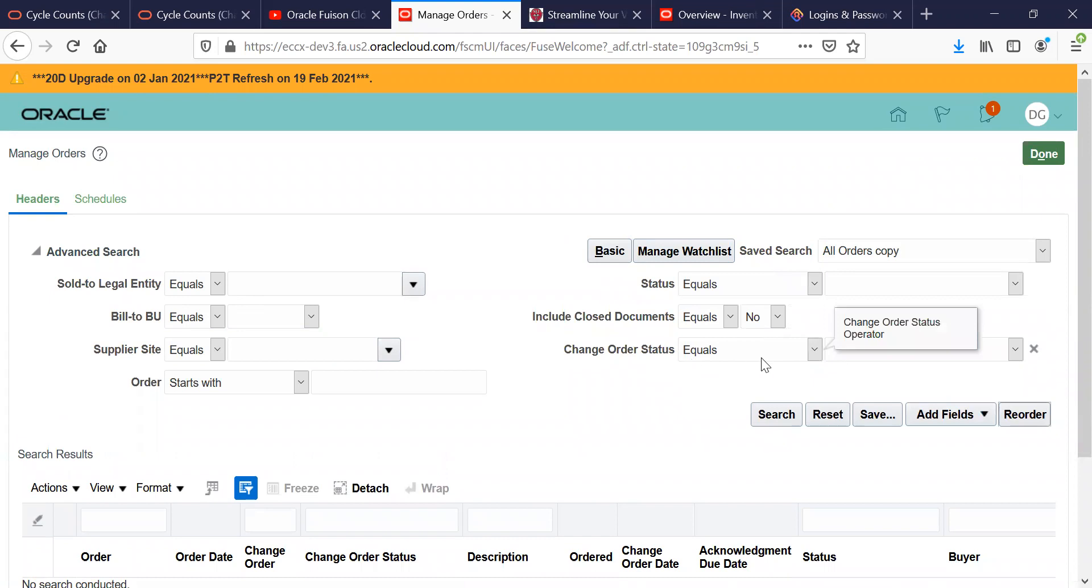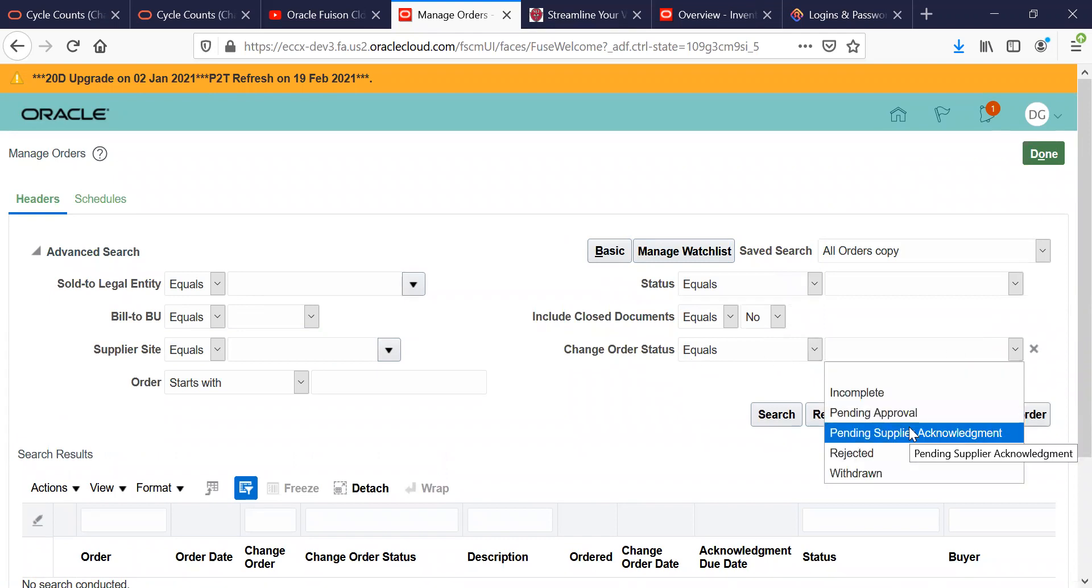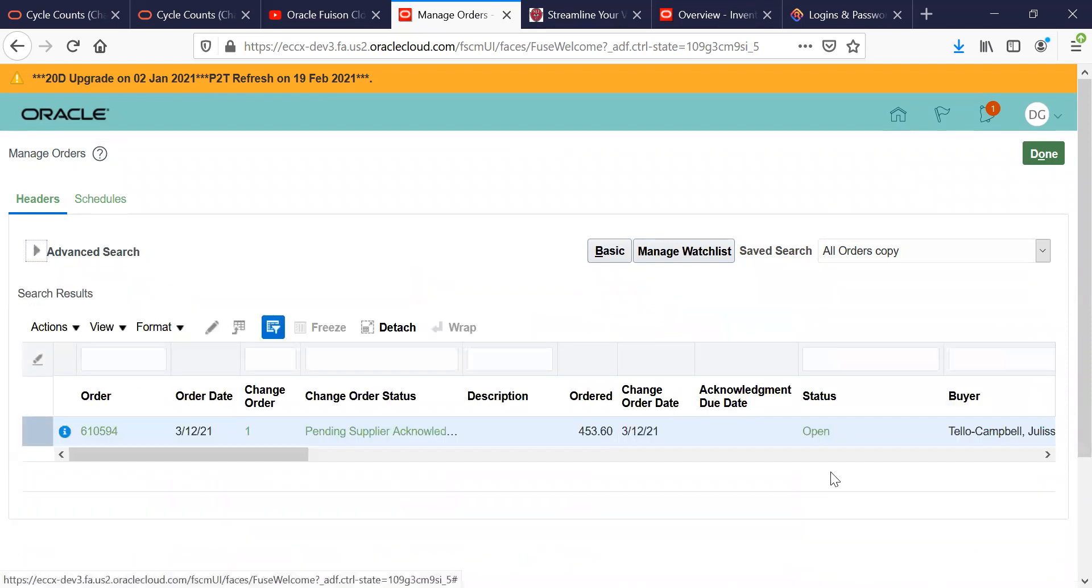When you get to the Change Order Status, you want to do the drop down and click on Pending Supplier Acknowledgement. What this is going to do is populate the purchase orders that still require an acknowledgement on the change order.